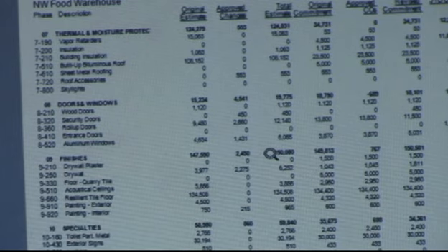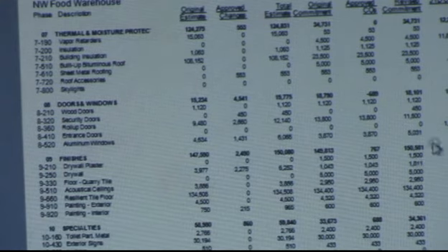Potentially, yes. So these bold lines here are at the division level. Here are each of my finish codes. Under this first code, 9210, my estimate was zero, but then I issued a purchase order for 1500. So this is just bad project management right here. Don't issue a purchase order under a cost code where you said you were going to spend zero.